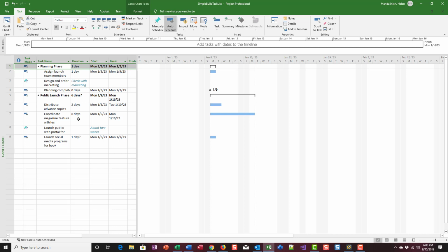The example they have here is that pre-press time and order paper are closely related. The start of scheduled pre-press time should initiate the start of order paper. So you schedule when it's going to be printed, and you have to order the paper at the same time so you have it when it's ready to go to press.